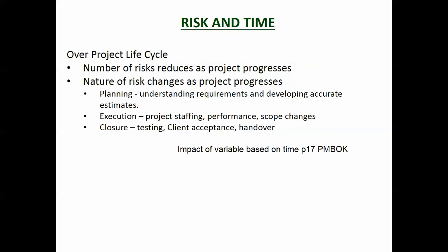During the execution, it's, do you get the right people? Do they perform as you require them to do? Are there scope changes? So those are the main uncertainties that happen there. And during testing, during closure, is the client going to accept it? Does the handover work? Does the handover provide the client with the information and skills they need to actually run the facility once you've handed it over?